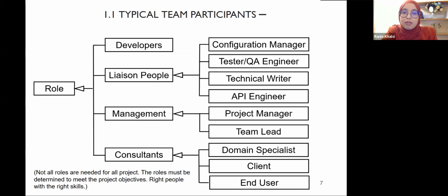But you might not have people who have enough knowledge in this particular skill. What to do in this case? We may need somebody who knows that specific programming language, but we don't, and we don't need to hire someone because maybe this task does not require a full-time employee in the company. So what we do in this case is hire a consultant for a specific period of time. So this is the main idea.